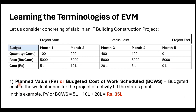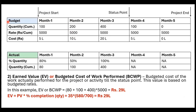The first term is Planned Value (PV), also called Budgeted Cost of Work Scheduled (BCWS). Planned value is the total cost that was planned or budgeted till your status point. For three months, adding ₹5 + ₹10 + ₹20 lakh gives ₹35 lakh. The planned value for the complete project is ₹40 lakh because fifth month is zero. Planned value is entirely based on the budgeted cost for the activity or project till your status point.